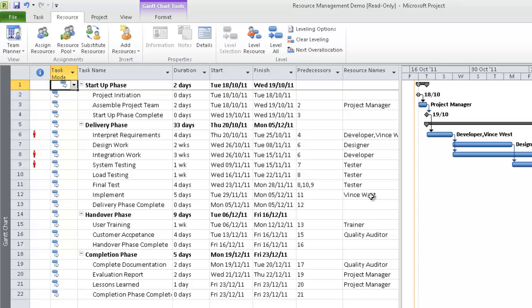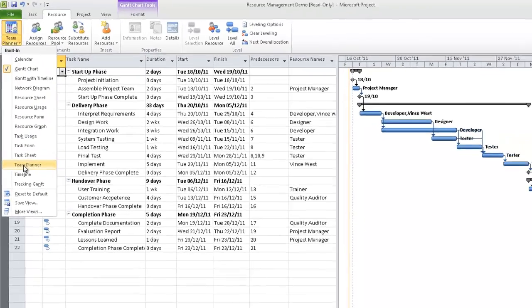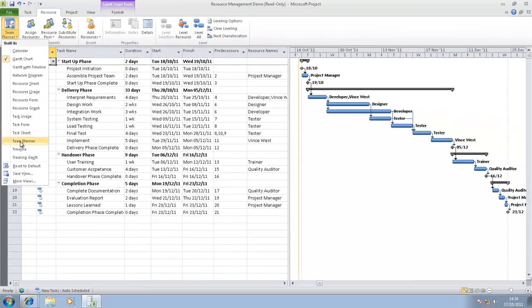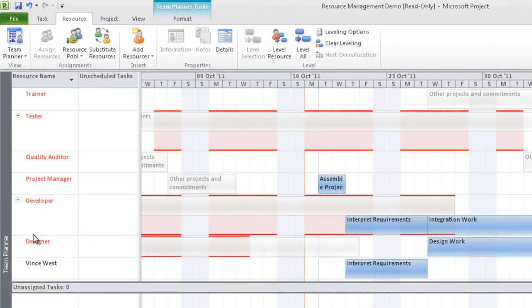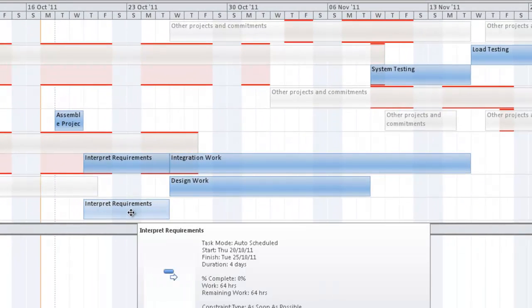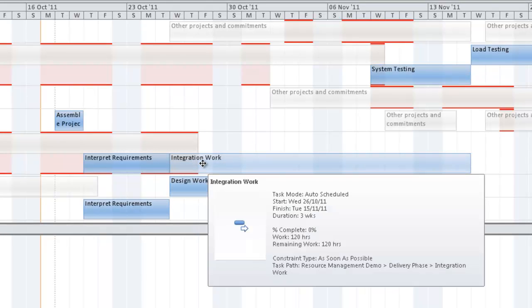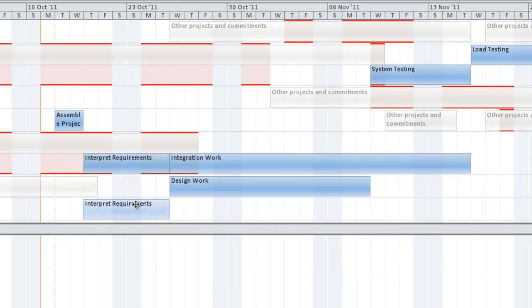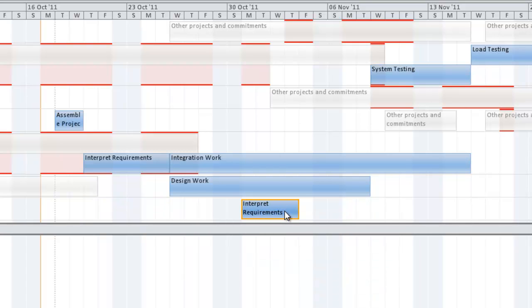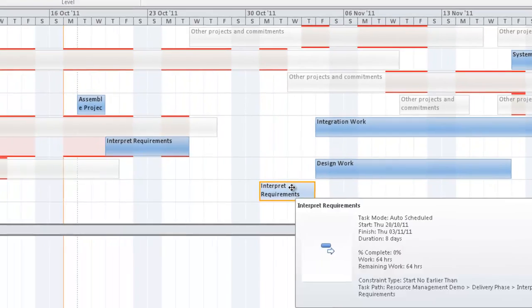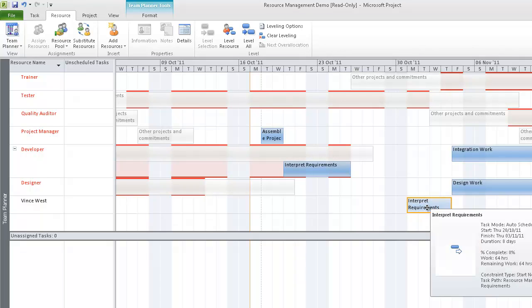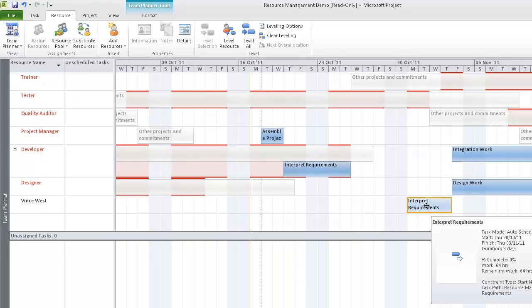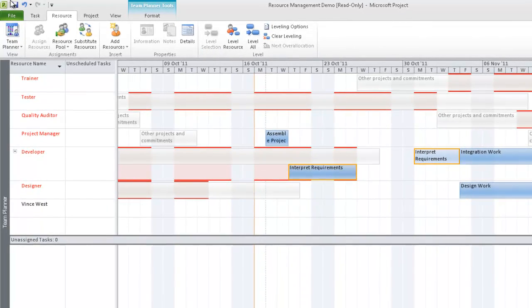Another way you can allocate resources is by going to the Team View, which is brand new to Microsoft Project Server 2010. Here we have on the left-hand side a list of all the resources assigned to the project, and then we have a calendar view. If I hover over any one of these tasks, I can get more information on them. The great thing about this feature is that I can click and drag tasks to wherever I want.